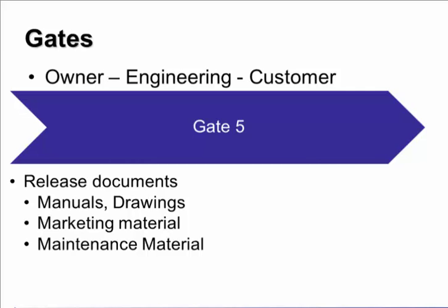the validation of the initial specs, and then the engineers or the vendor has to provide documentation for the ongoing operations and maintenance of the system. So it becomes really important that any type of documentation and also proof of delivery is there, so that the customer can then take ownership.